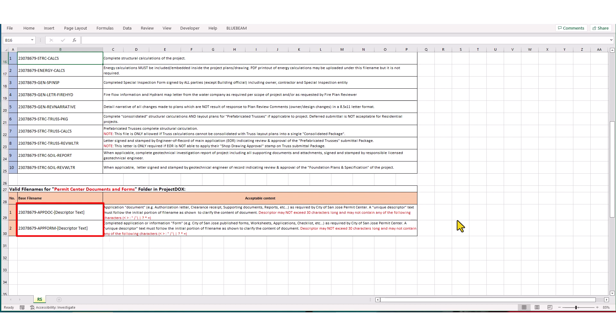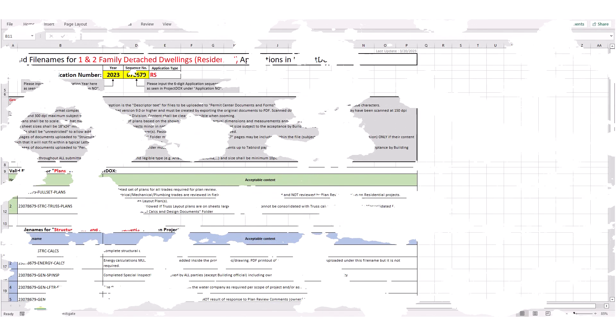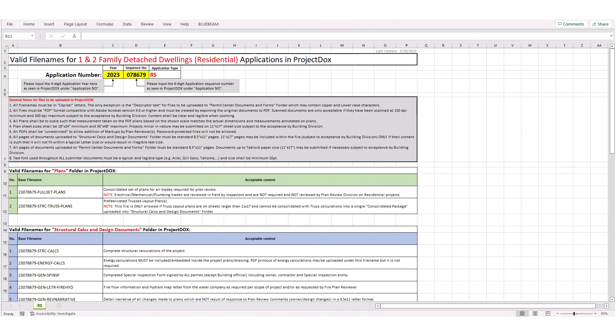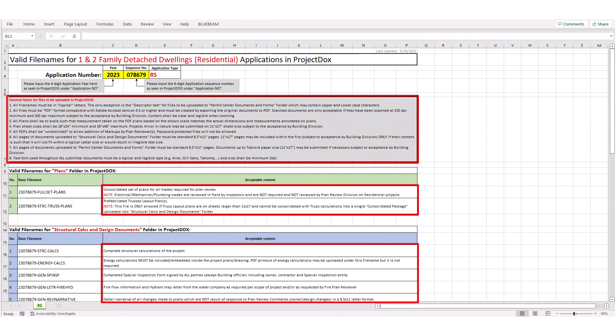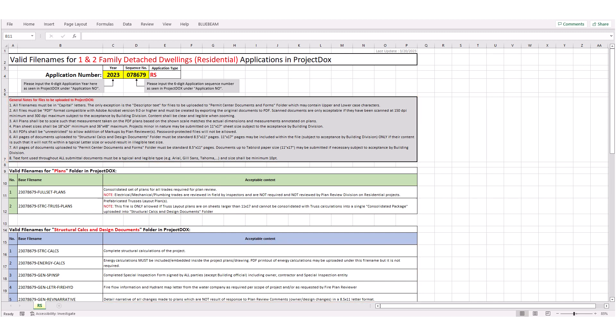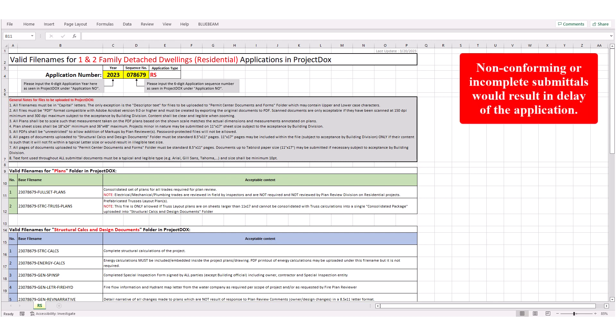For files that are to be uploaded to permit center documents and forms, you must include a short descriptor text at the end to identify the content of the file. You must thoroughly review the information shown in this spreadsheet, along with other guidelines for electronic plan review submittals through Project Docs, to ensure uploaded documents meet all the requirements. Non-conforming or incomplete submittals would result in delay of the application.